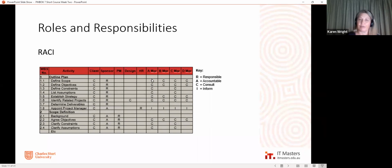But you go through and you complete it in consultation with the person themselves. So this person here, manager A, they know they're going to be consulted about all of these things, they know they're going to be informed about this thing, and they know they're going to be consulted about these three things down here. I'm the PM, so I know I'm going to be responsible for these things. The sponsor knows they're going to be accountable for these things. The client knows they're going to be consulted about these things. So it's a really good way of just making sure that everyone knows what their job is on the project, and that can help overcome any conflicts as well.